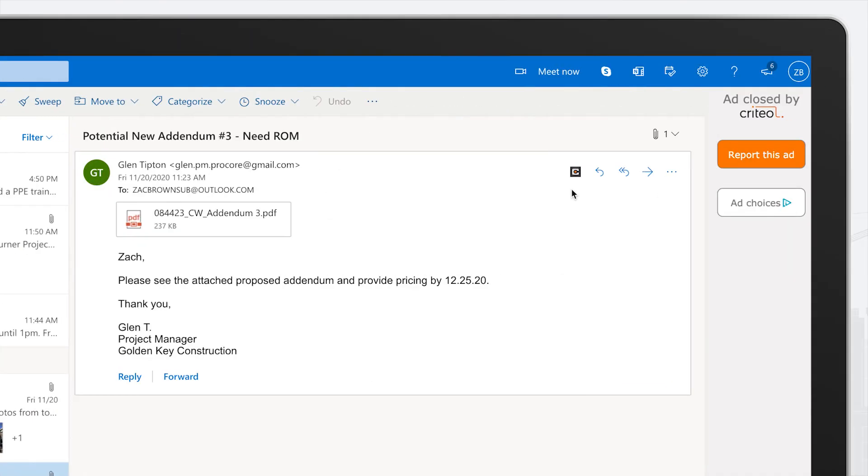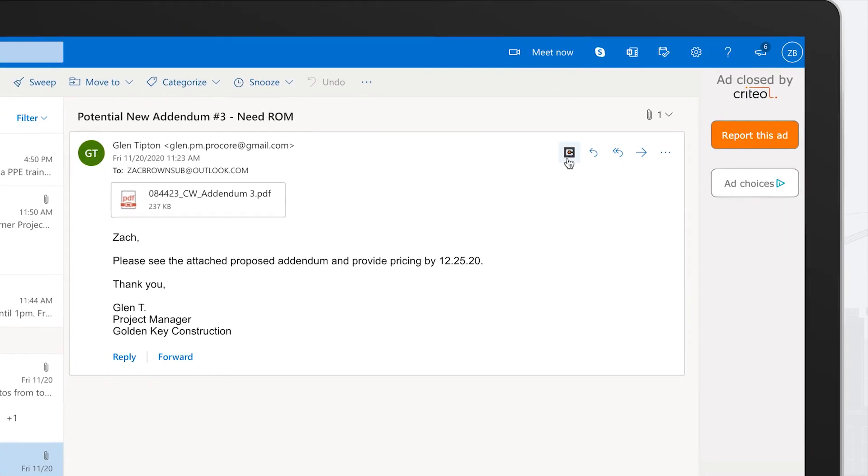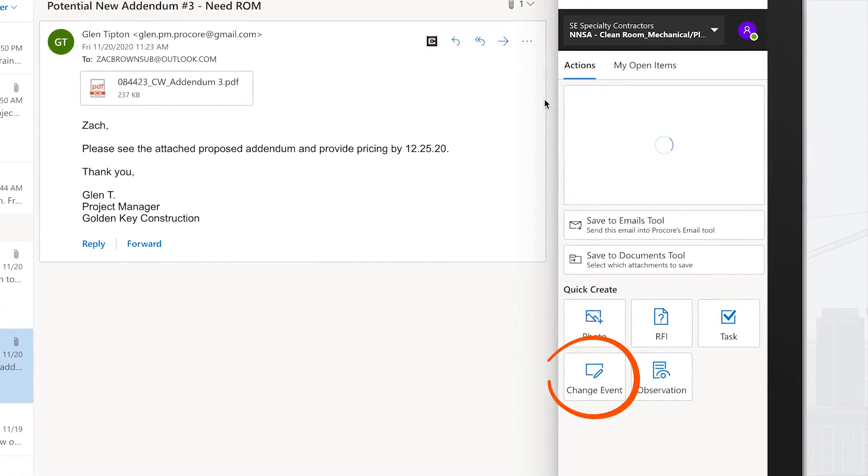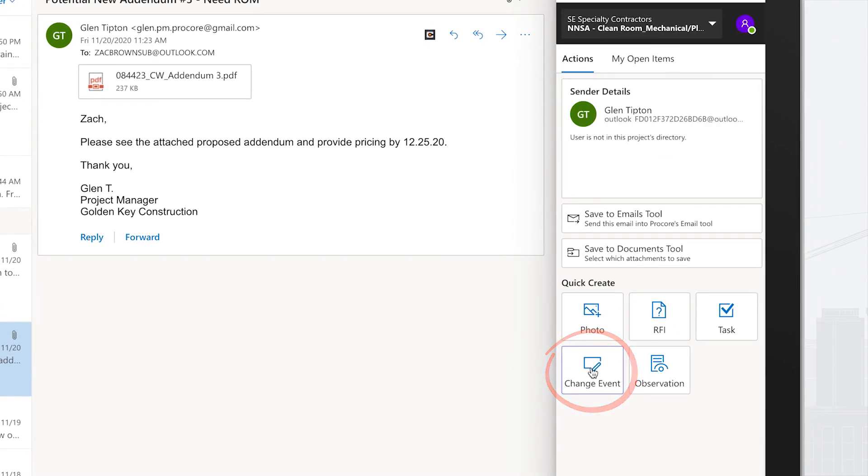Received a proposed addendum and ready to initiate a change order? Create a change event with the attached proposal and promptly put together a rough order of magnitude.